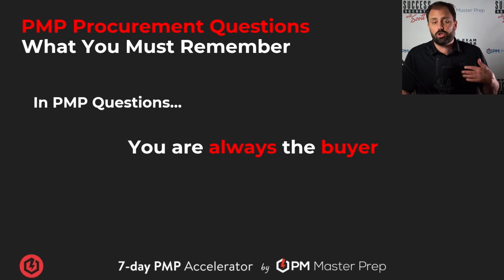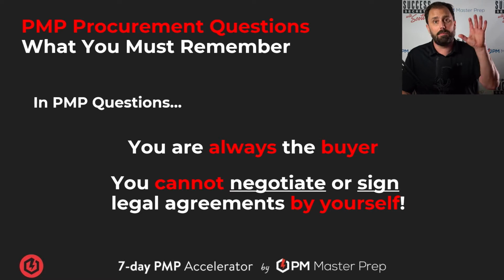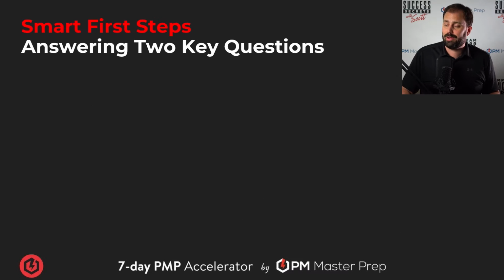Things you've got to remember. In PMP questions, you're always the buyer. You're always getting the services. You can't negotiate as the project manager. You can't sign any legal agreements by yourself. No. Go to the procurement department. In the questions, it'll say, establish an agreement with somebody else. You know right off the bat that's not an acceptable answer, because you can't just go signing that name, right? So that's not an acceptable answer. You must leverage procurement and legal.